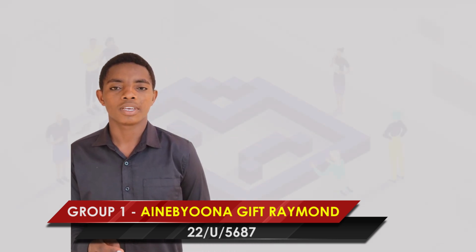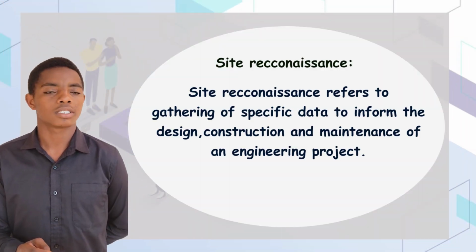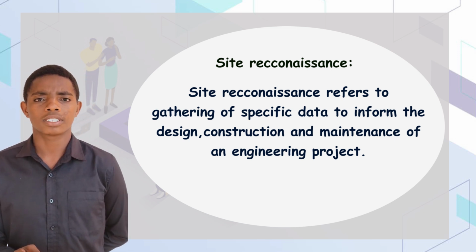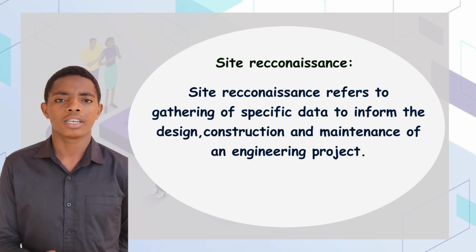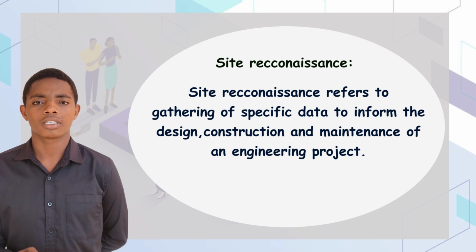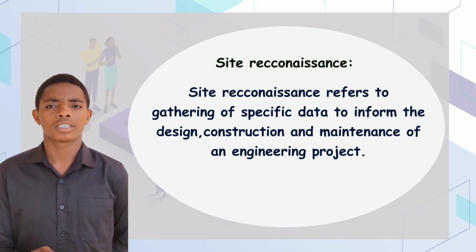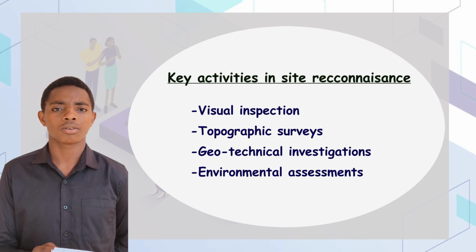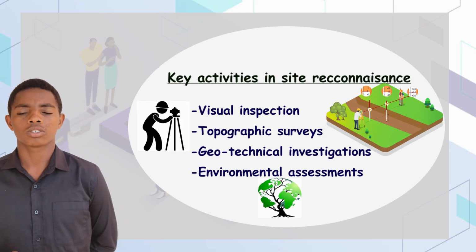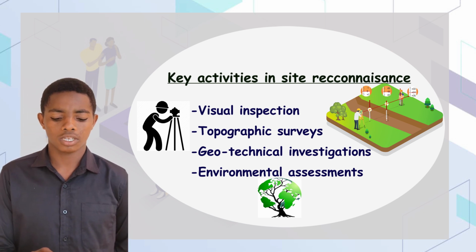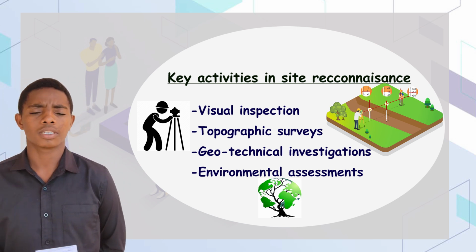My name is Gift Raymond Aineviona from Group 1. I'm here to talk about site reconnaissance. Site reconnaissance refers to the gathering of specific data to inform the design, construction, and maintenance of the engineering project. Key activities done in site reconnaissance include visual inspection, topographic surveys, geotechnical investigation, and environmental assessment.